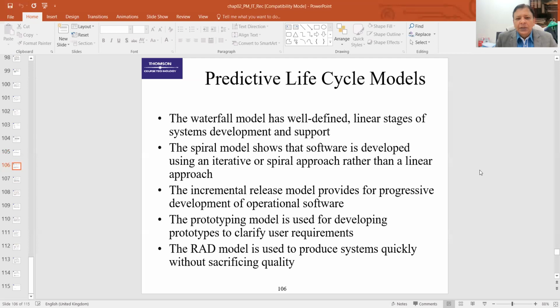Today, I'm going to cover the RAD methodology. The RAD methodology is also called Rapid Application Development Methodology, and it has 4 phases: requirements and planning, modeling, construction, and cutover. The 7 phases of waterfall methodology are merged into 4 phases. For example, project identification and selection, project initiation and planning, analysis. They are covered in one phase called requirements and planning.